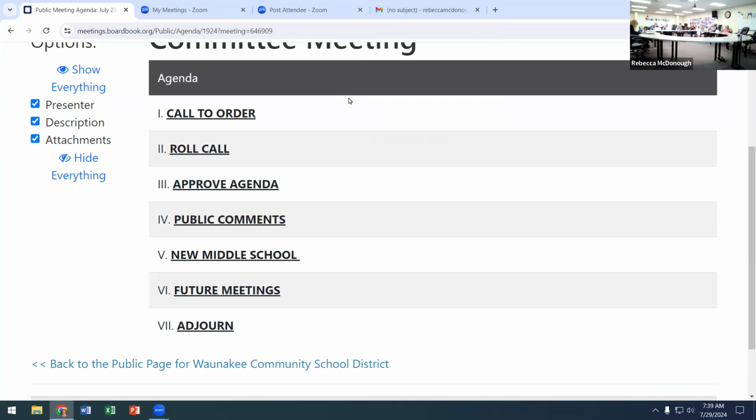During the course of the demolition, we were required to open up walls, open up ceilings, do everything. We started pulling down those panels and pulling down the skim coated plaster. And we found a thin layer of asbestos containing material buried beneath the new building finishes. And when we punched holes in, we determined that it was present at varying degrees throughout the entire north gym ceiling. We sampled the building material, and it came back as asbestos. It's a type of material that needs to be removed prior to demolishing the building.